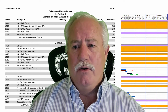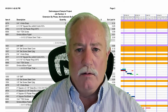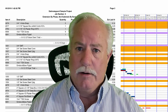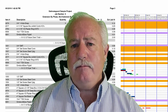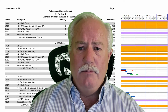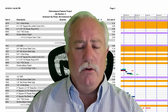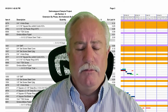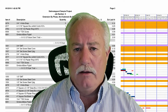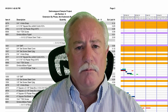And I don't care how your company bids their projects. I understand that estimating and winning projects is a numbers game, and that you have to get a lot of bids out fast in order to capture your 10% or whatever your get rate is. But once that project is won, then someone needs to make a very detailed task-integrated estimate to capture not only the labor by task, but also the material by task, because there are huge benefits to doing that. And so I'd like to just take a minute and go over that process and solidify it in your mind one more time.